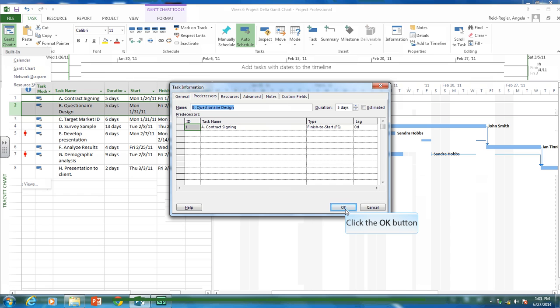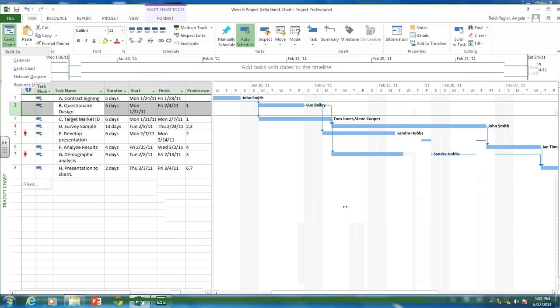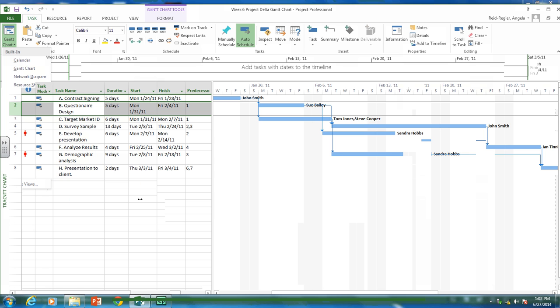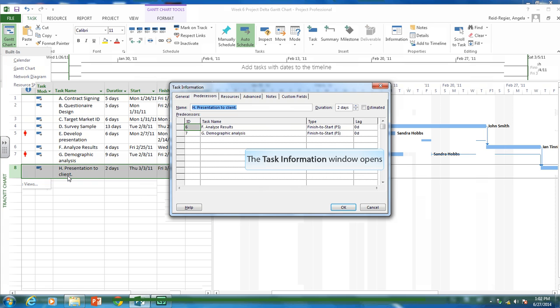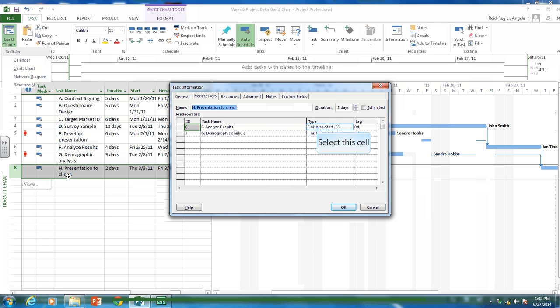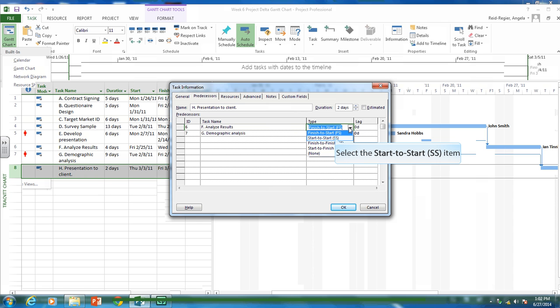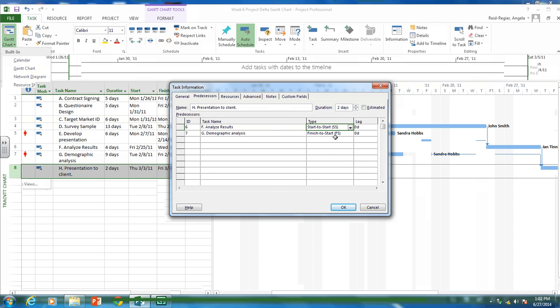So let's look at presentation to client. So we have that it can't be done or started till all other activities are complete. But let's say we really think about this. And you can start the presentation at least when most of the things are done. So let's change this. So right now we can't start it till analyzing results and demographic analysis is complete. So I'm going to change this to a start to start relationship.